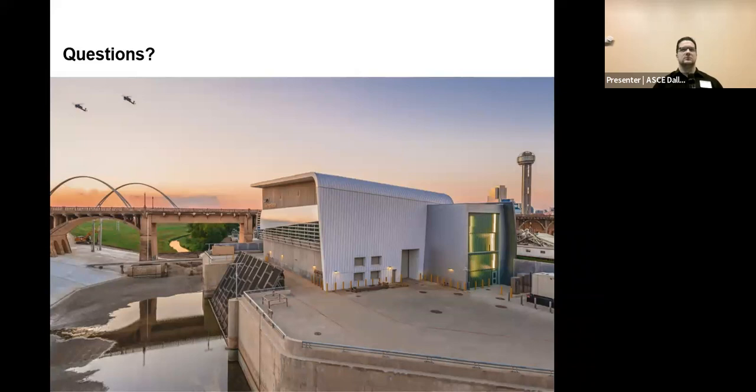During some of the first pump tests, I noticed that the vent pipe coming up near the roof had water discharging out of it, because there must have been some blockage that triggered the vent pipe to vent. It also vented water coming down on the switch gear down below. We didn't want that. We wanted to get it covered because we didn't want a water column coming down there and shorting out the circuit and so on. So that was one thing that was learned.